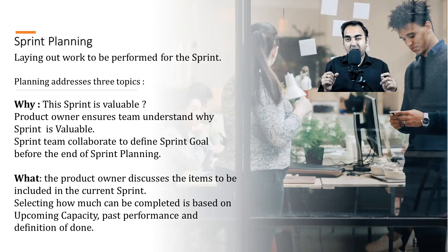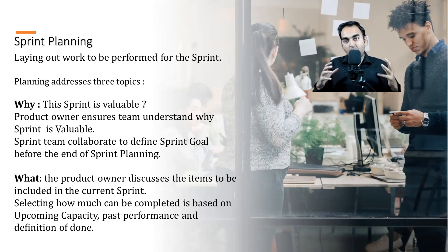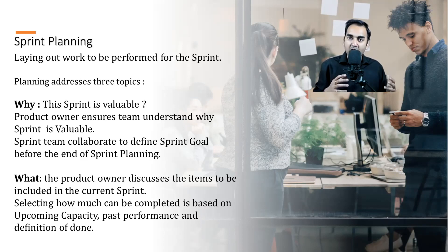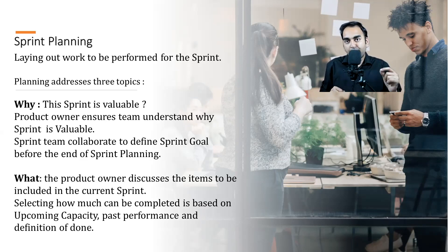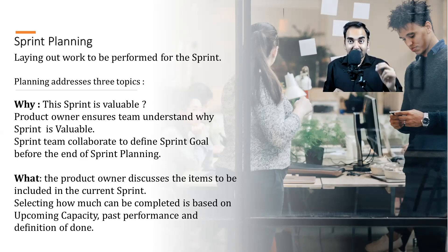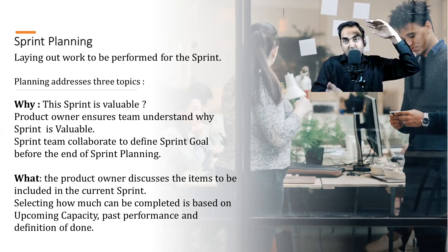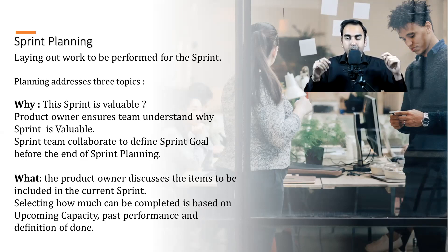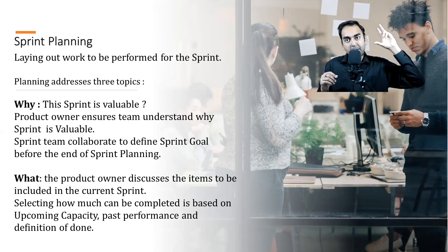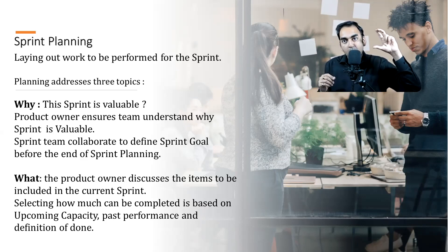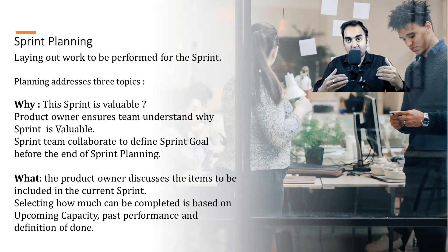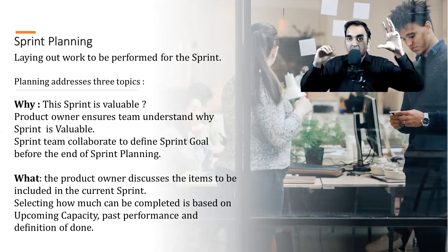Once the team understands why, the second aspect is what needs to be done. Suppose you want to build a banking app requiring 50 features — all 50 cannot be developed in one sprint. It's important for the product owner to decide which five or ten most important items the team needs to build right now. That's prioritization. This list is called the product backlog, and the product owner describes the top items and why they need to be done.